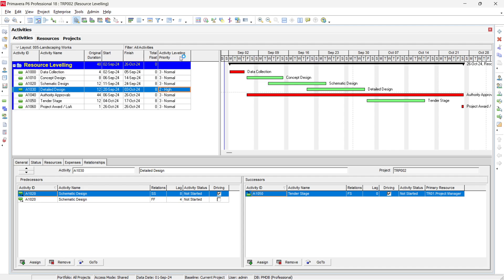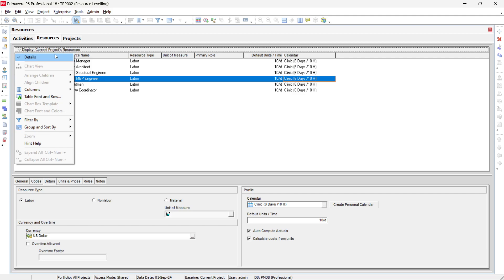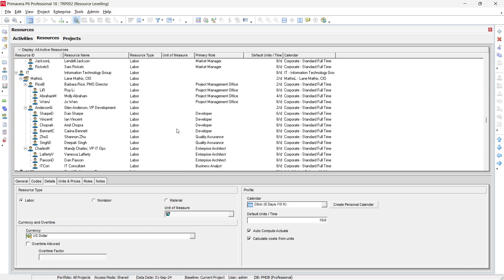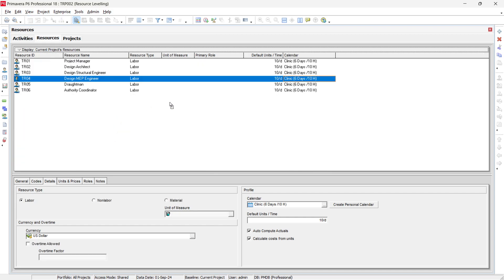You can define all activity priorities in the Activity Leveling Priority column. When you go to Resources, filter to show only current project resources so it is easier to locate them. Make sure the time for each resource coincides with the project activities' time schedule — it is better to use the same calendar for both project activities and resources to avoid any conflict.